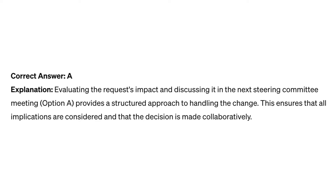Correct answer: A. Evaluating the request's impact and discussing it in the next steering committee meeting provides a structured approach to handling the change. This ensures that all implications are considered and that the decision is made collaboratively.